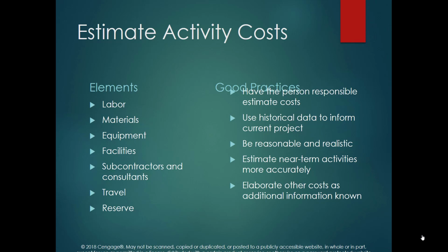The same way that we did for the project duration, we assign each of the work groups to a person or the organization or some department that has experience in this work group, and then they can predict the time and the cost that a work activity needs. So this assignment brings them some responsibility, and also this estimation should be realistic and reasonable. It should not be optimistic or too optimistic. It should be really based on the fact and the reason. They may check the historical data of the projects and try to have a better estimation of the cost of the project.